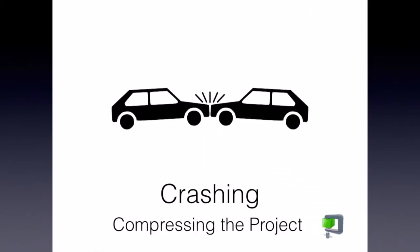Crashing or compressing the project is something that we do to reduce the amount of time that our project takes. It involves evaluating the critical path activities and seeing if they can be reasonably reduced in time, and more than that, seeing if they can be cost-effectively reduced.